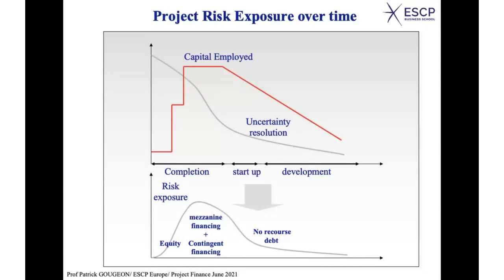Well, maybe it will be 8.5, 8.6. So you need to make sure that in case it is a bit more expensive than expected in the first place, you will find the money you need to go on with the project. Even if it costs 10% more, you have to be ready to cope with that because the project might still be viable even if you have to spend 10% more, okay?